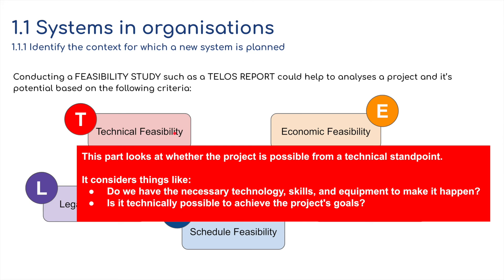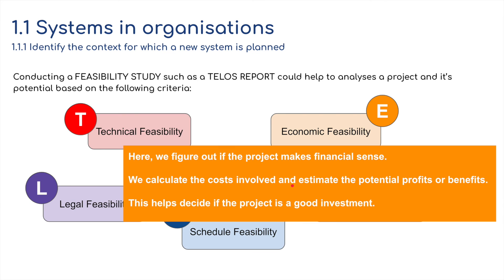Technical feasibility looks at whether the project is possible from a technical standpoint — do we have the necessary technology, skills, and equipment? Is it technically possible to achieve the project's goals? For economic feasibility, we figure out if the project makes financial sense by calculating costs and estimating potential profits or benefits, helping decide if the project is a good investment.